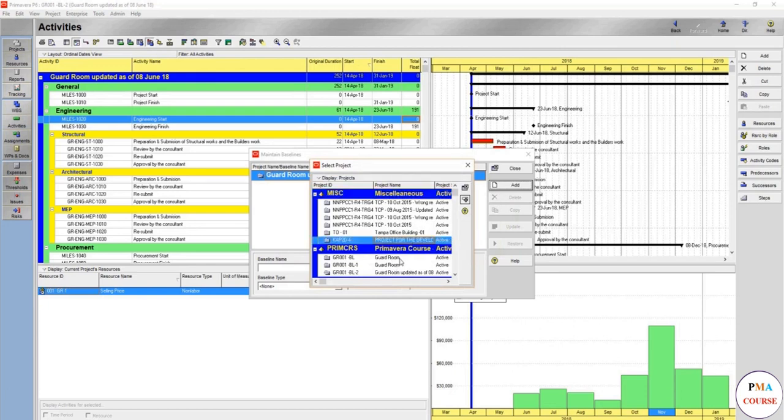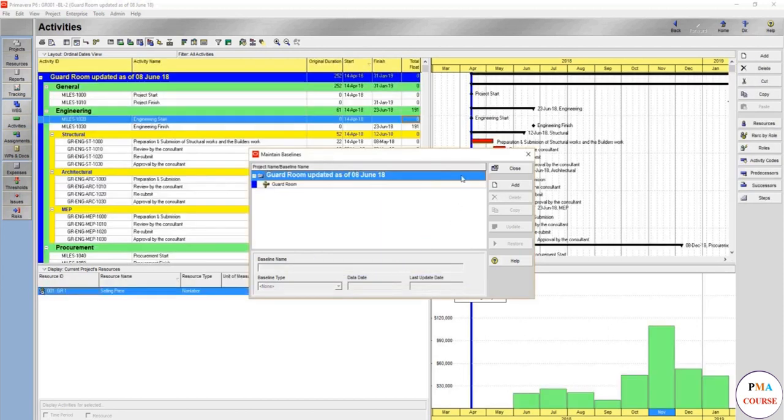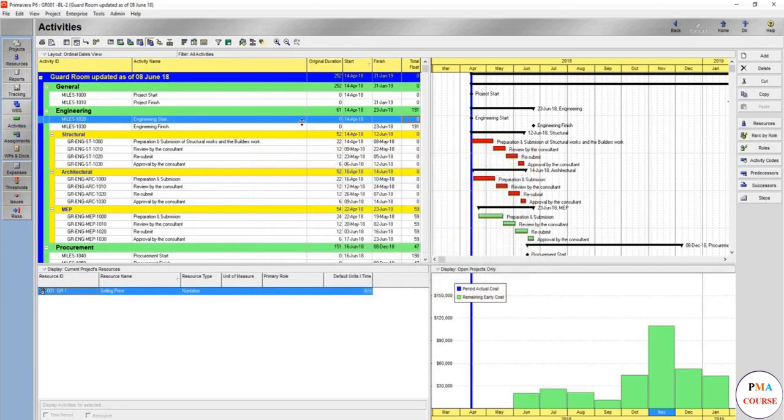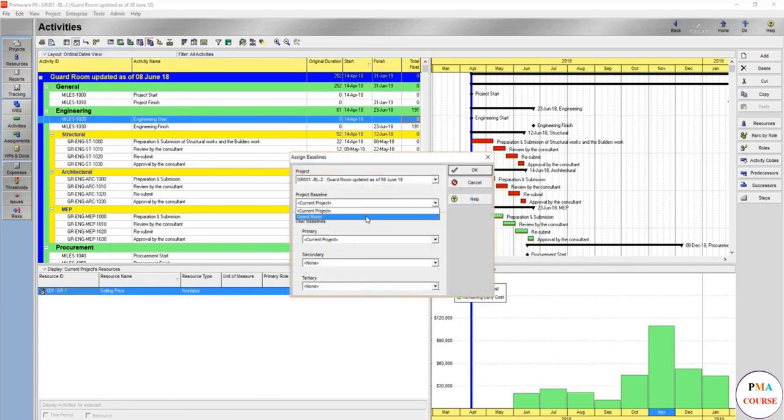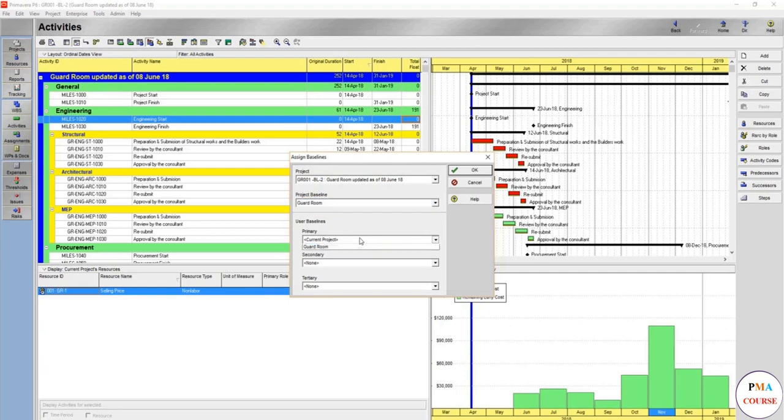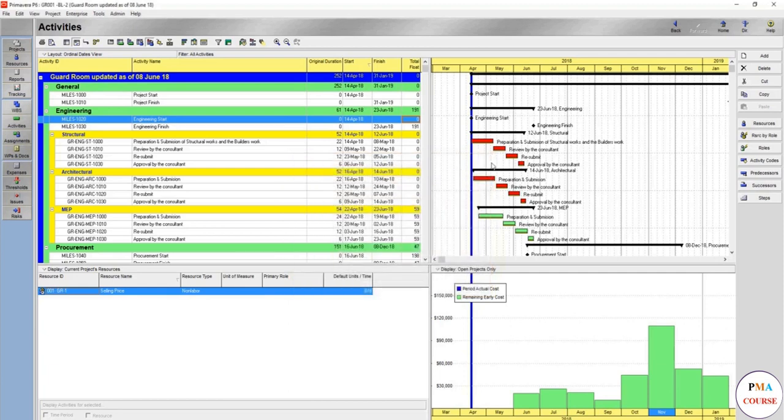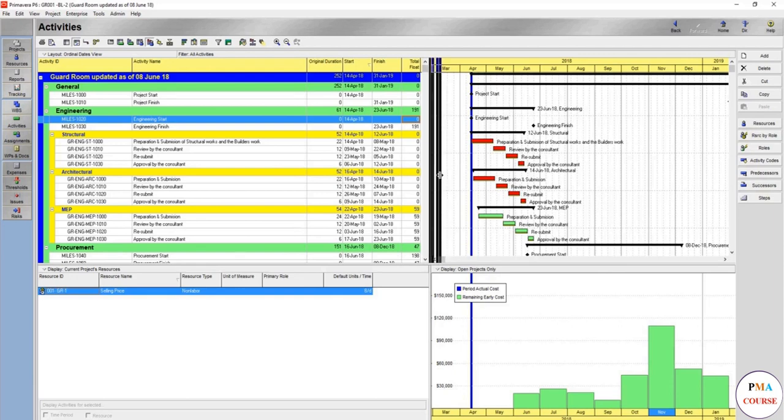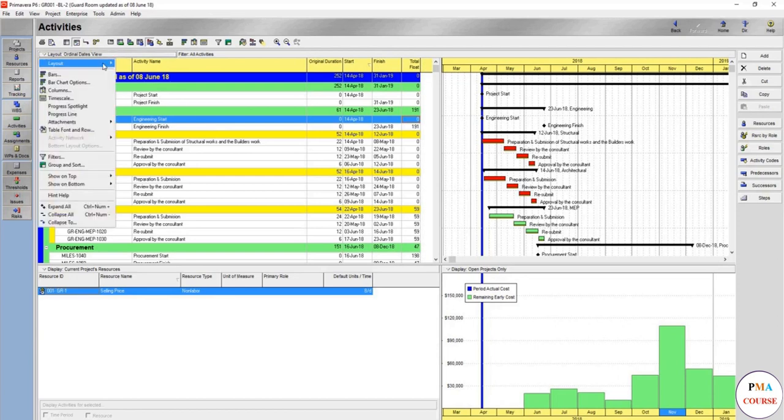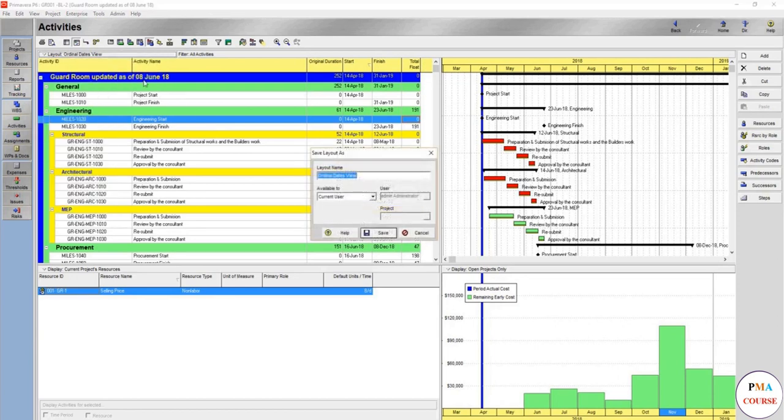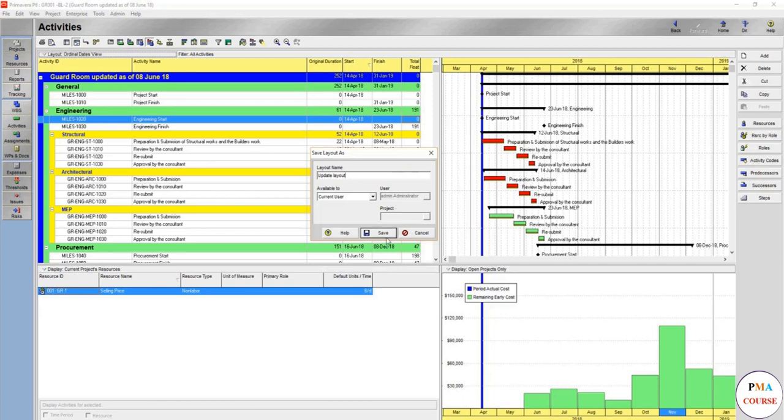I do not recommend save a copy. I recommend always to take a copy outside and then convert another project and then you're going to take this one to always leave the baseline as a separate schedule. Make sure that you assign guard room baseline. It's exactly the same because no update happened at all. You might save as update layout because you might want to show different items in the update.